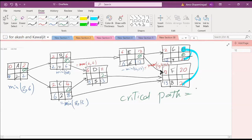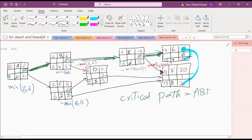What is the critical path? We have to double-arrow it. A, B, E, G. Very good. This is the critical path.